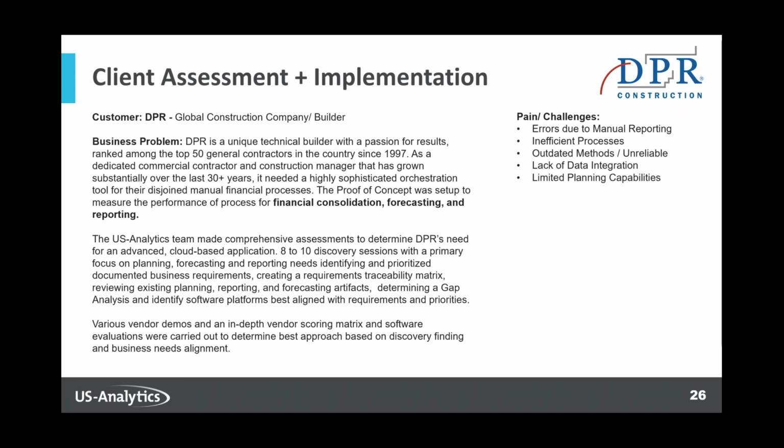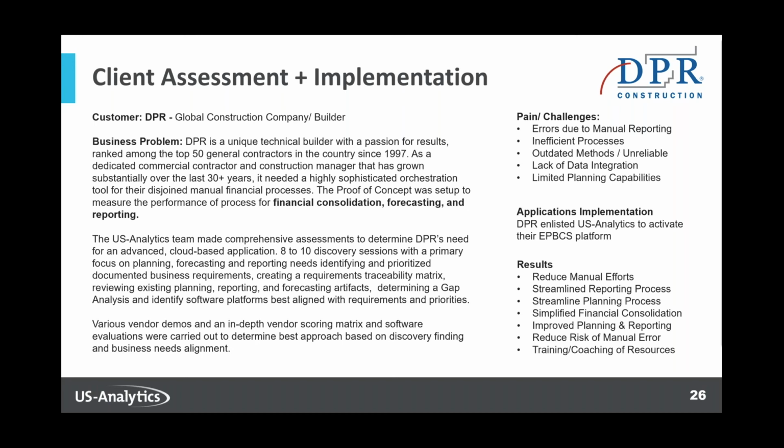So we came in, we did that assessment. We did just under a dozen discovery sessions focusing on their planning and forecasting and reporting needs in their particular case, understanding where they were, understanding where they wanted to go, and could they get there with their existing systems? Did they need to maybe reuse some of those or tweak them? Maybe they had to re-implement, make all of those conversations happen within the DPR group so that we can understand, and we did scoring metrics based on what software was out there. And then they ultimately decided on the eBPCS, and we implemented that for them.